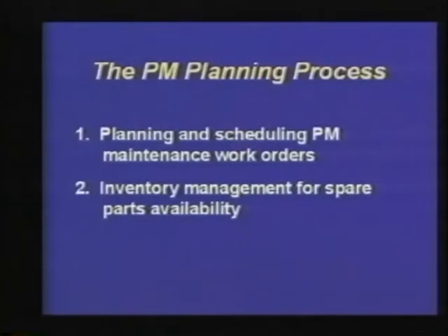That means to establish a date as to when we want to execute that particular PM requirement. In that first step, we are going to consider craft capacity requirements. The second step is if there are spare parts required, then the inventory system has to pick up the spare part requirements.